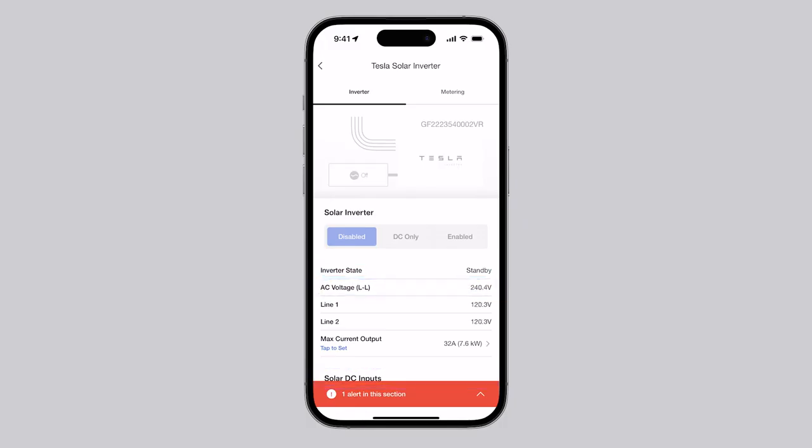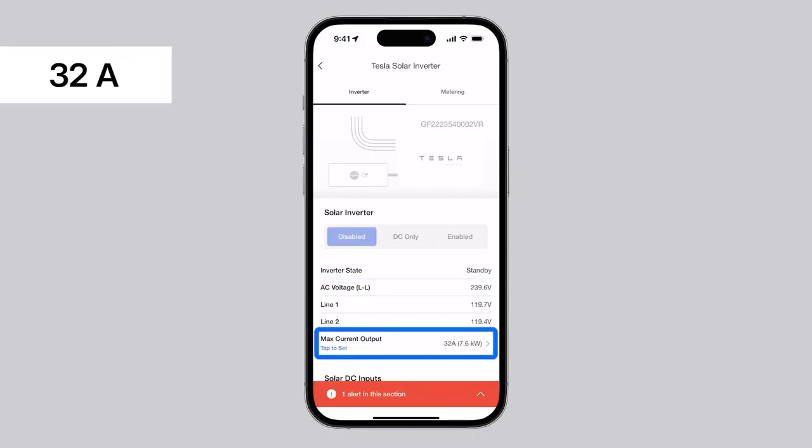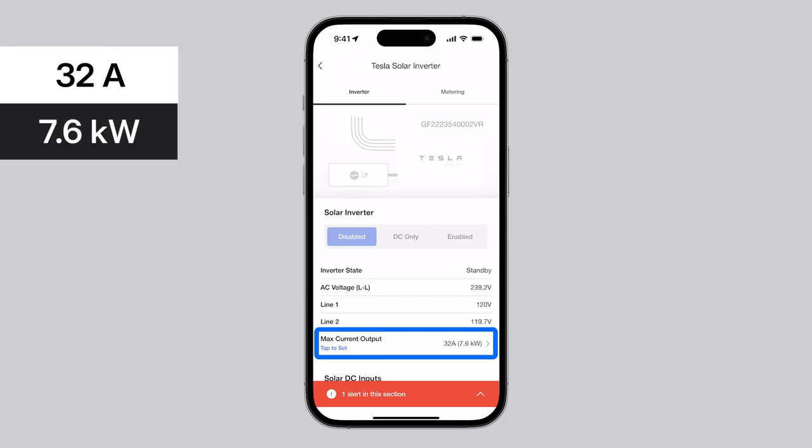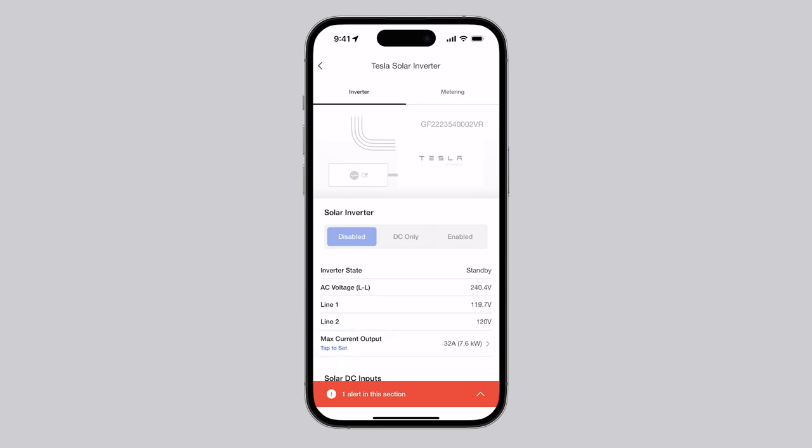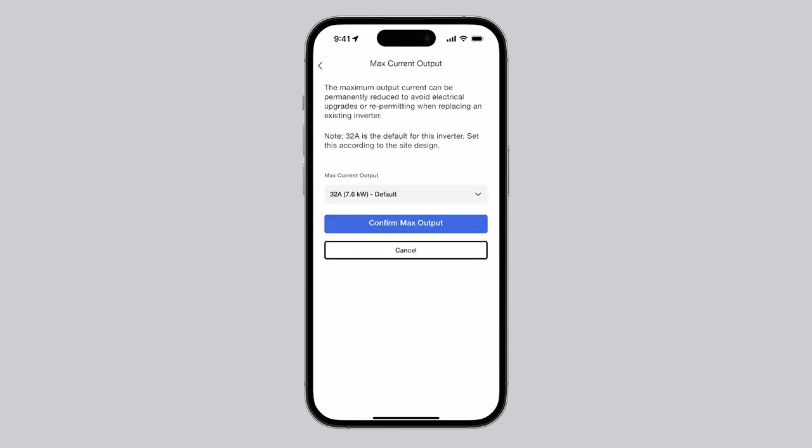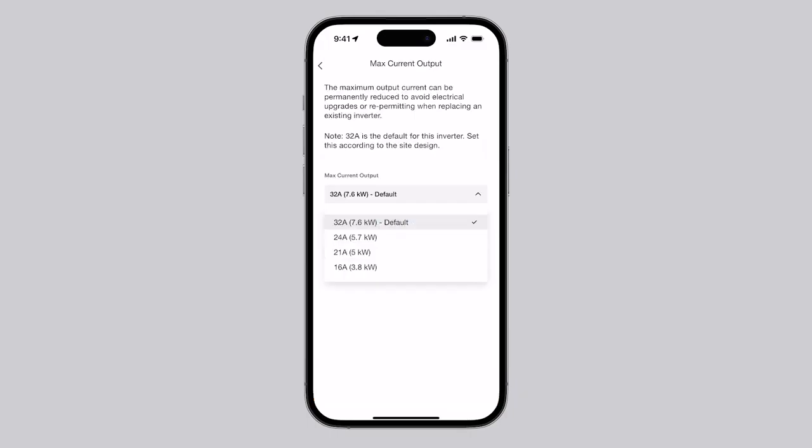The default maximum current output for Tesla solar inverter with site controller is 32 amps, which is the equivalent of 7.6 kilowatts. This value can be permanently configured to any one of the following current levels during commissioning.